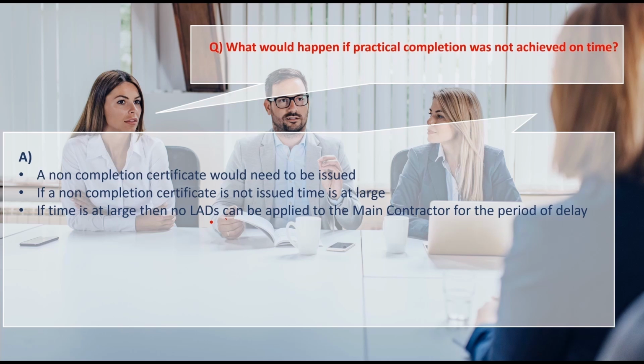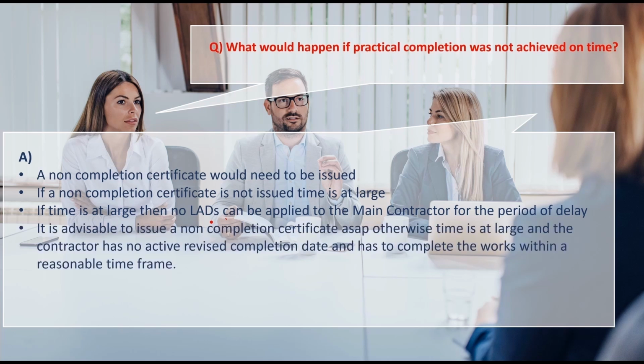the period of delay. And we have to say here that it's very advisable to issue a non-completion certificate as soon as possible. Otherwise, if time is at large, the contractor has no active revised completion date and only has to complete the works within a reasonable time frame.